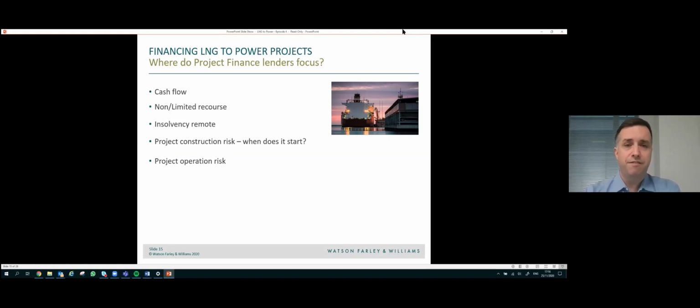If lenders are financing the conversion or the construction costs of the FSRU, then lenders are going to focus in on when project construction risk starts and ends, with the aim to dovetail the lending structure during that period with the contractual milestones under the construction contract or the conversion contract. And we do see more reliance being placed on recourse to sponsors during this stage than once the FSRU is operating within the LNG to power project.